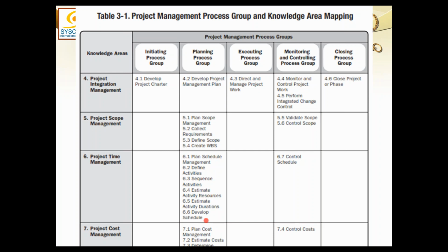of any future change. As a project manager, you do not have any authority to change anything in this baseline anymore until and unless there is an approval on a change request by the project sponsor. Then you will be allowed to change the baseline. Okay, so that means the final version of that specific knowledge area plan, that knowledge area plan is a baseline.